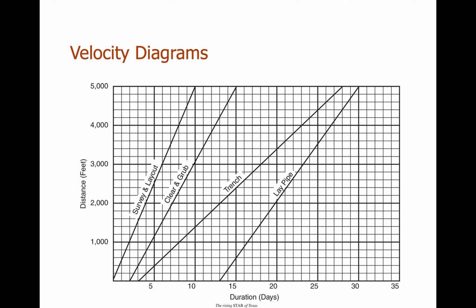Okay, so then how do I figure out when that starts? Well, 30 minus the production rate of 17, if you go back in the slides and see, gives us the 13th, which is down here. So that tells us when it should start, such that it finishes 2 days after trench. So the previous slides were articulating this process of looking at the activity's finish date to figure out its start date. So that's how we figured out lay pipe, such that the line doesn't ever overcome trench.